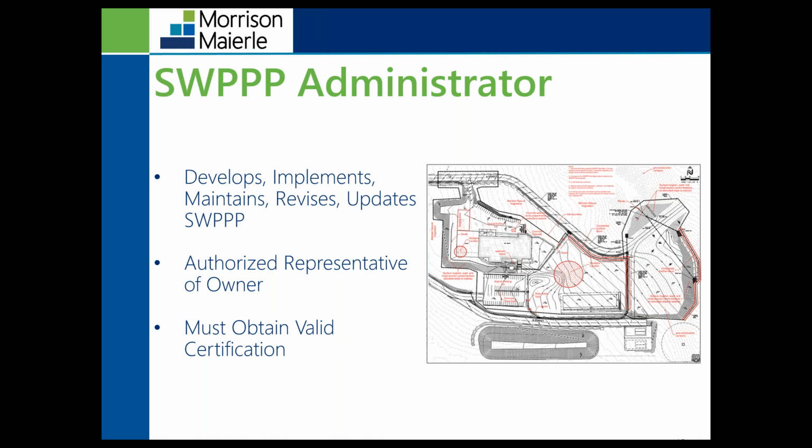So a SWIP administrator is someone who is responsible for developing, implementing, maintaining, revising, and updating the SWIP. Someone who must be knowledgeable of the principles and practices of erosion and sediment controls. They must possess the skills necessary to perform inspections to assess site conditions and determine the effectiveness of selected BMPs. This is someone also who is an authorized representative of the owner and can sign documents and other information requested